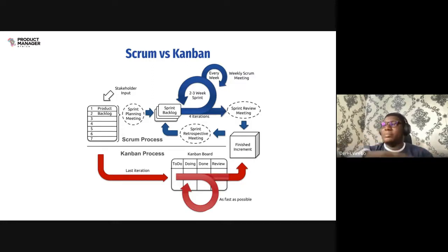Now, during the sprint planning meeting, that's when your team decides, okay, we have 200 items on the backlog in order of priority. How many can we pick up into our sprint? Now, it's good to remember that picking up items into your sprint is always dependent on the story points. If you're in the Scrum methodology, you always have to use story points. Right? Now, your team, and I think William mentioned this when he was speaking, you have what you call your sprint velocity, your team's velocity, right?